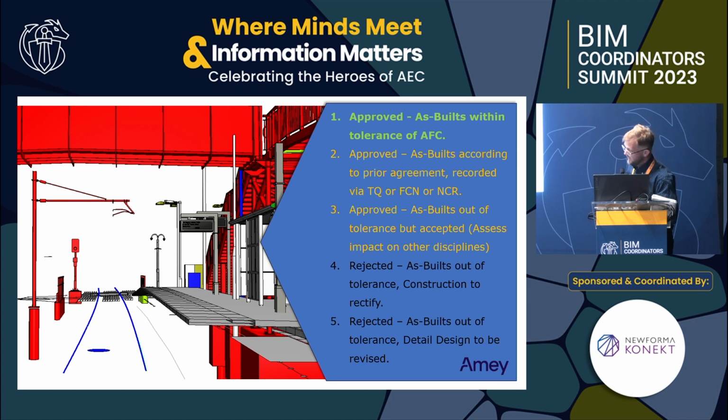Your second outcome is where, hopefully, if something was installed different on site, you knew about it in advance. You knew about it either through a TQ or a field conformity notice or an NCR, which I've forgotten right now. Sometimes it does happen where things are a little bit different and you didn't get formally notified, and you've got to make a decision, well, do I approve it? But number 4, crucially, all design teams should have a say in whether they accept or reject what's being built. And if like number 4 says, if it's out of tolerance and you as the designer don't accept it, you should be free to reject it.